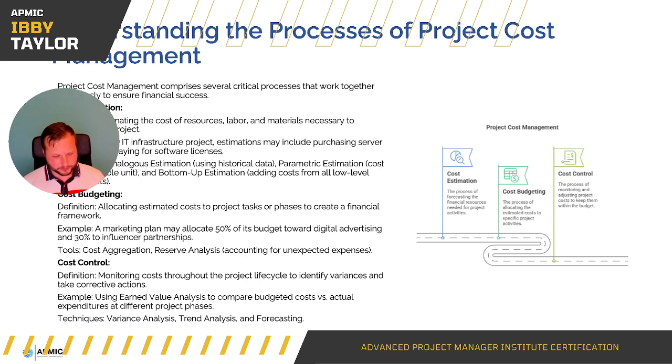And then cost control: monitoring costs throughout the project lifecycle to identify variances and take corrective actions. Very important. Using earned value analysis, EVM, earned value management, to compare budgeted costs versus actual expenditure at different project phases. If you've got certain budgets for each phase, it's always good during the closure of that phase to go, right, we said we were going to spend $10,000. How much did we spend? If we're under, why are we under? Did we miss something? Did we do something very well?